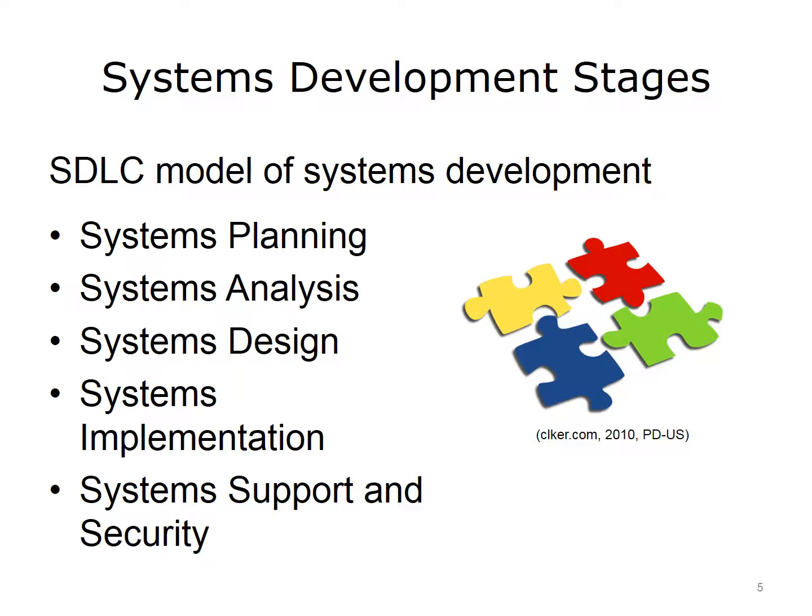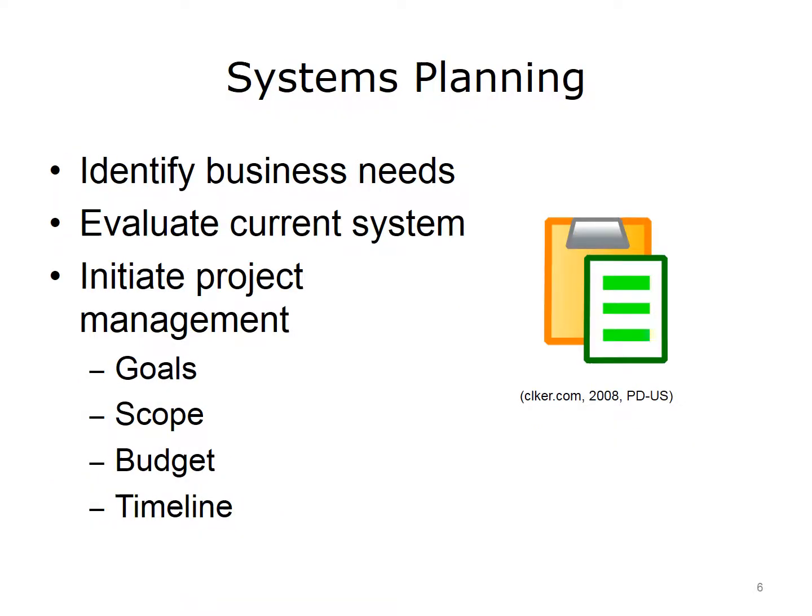Over the next few slides, we will explain each of these stages. The first activity, systems planning, involves the initiation of the information system project. It starts with identifying the business needs that the system will address. If a new information system is to replace an existing one, then the current system is evaluated to determine to what extent it is already meeting or not meeting the business needs. Anything missing will potentially be part of the new system. At this point, the project begins and standard project management goals are determined. The ideas for the new system are narrowed down to a set of features. The budget for the project is set, along with an initial timeline of development.